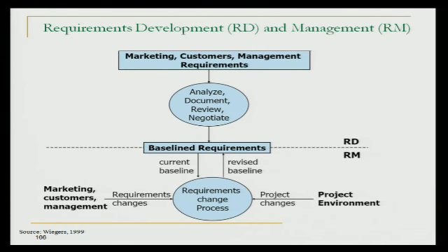At some point it makes sense, in order to manage change, to just say, you know what, we're close enough, we're going to baseline. There are a couple of ways you can implement that. One way would be to establish a configuration management version for that requirements baseline. What that means is anything beyond that baseline now has to go through a more formal process.